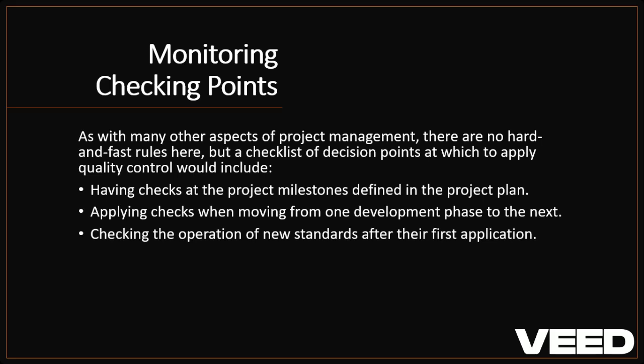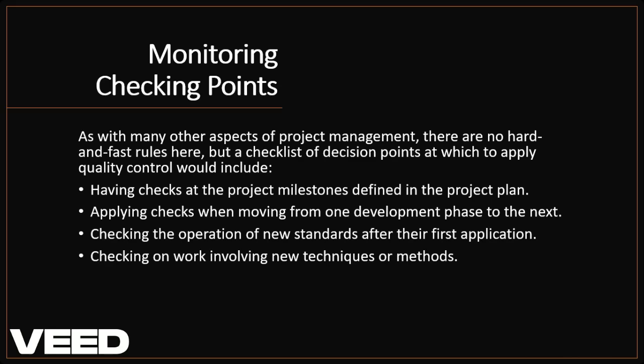You can also apply checks if you are using new standards in a project which have not been used before. Because you are doing something for the first time, it's important that you apply checks to ensure that you are conforming to what the standard is stipulating. This also applies to technologies that are new to the team as well as new methods that have previously not been utilized in the team. For those activities where you are doing it for the first time, the number of checks you perform will be different to those activities that you have done before, where you have the experience as a project team.